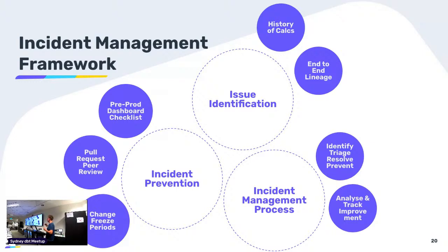But then also after the incident, we have a post-incident review meeting, and so that's talking about what went wrong, why it went wrong, 5 whys kind of stuff. And then we assign improvement actions, which we then try and slot into our sprint planning. So that's been really helpful because we're identifying trends. We noticed that a lot of the issues we were having were actually common causes, right? And so we've been implementing proactive things to try and stop that.